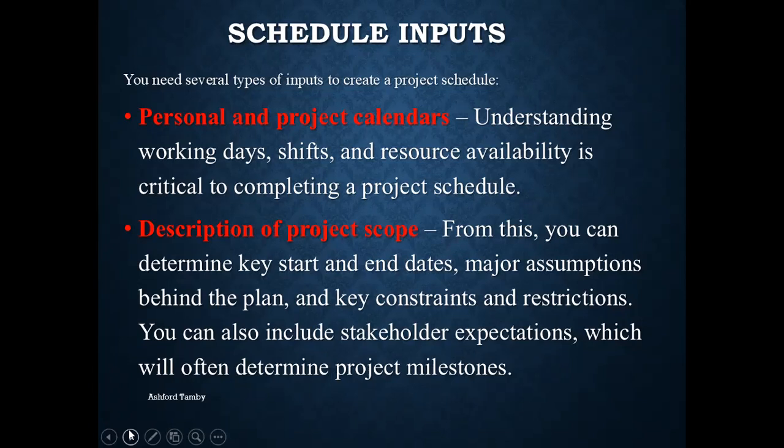Also, if persons get sick during your project, or if someone applies for vacation during a project, right? Sometimes you as a project manager are not made aware of these things because it usually has to go through HR. And because persons might not have been directly reporting to you before, they would have made the application through their direct line supervisor. So, all these things, resource availability.